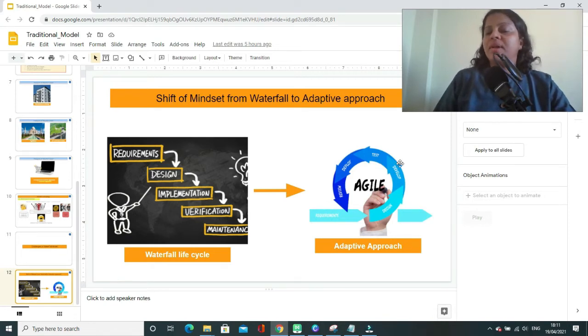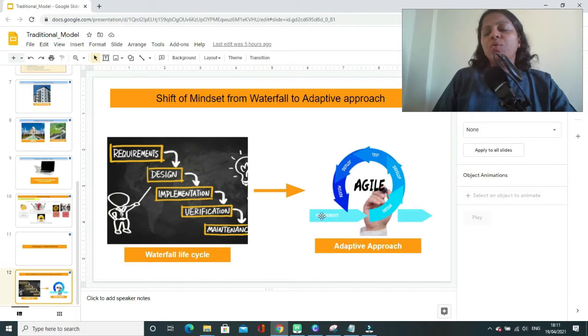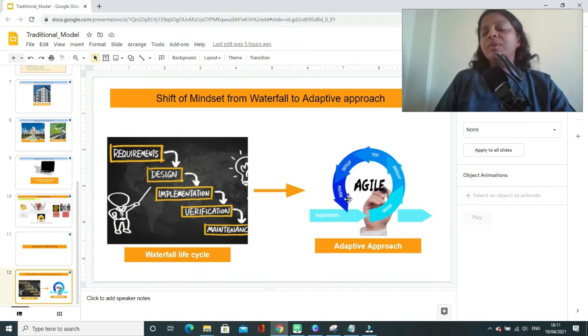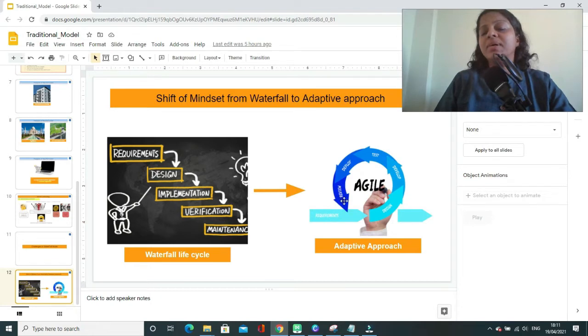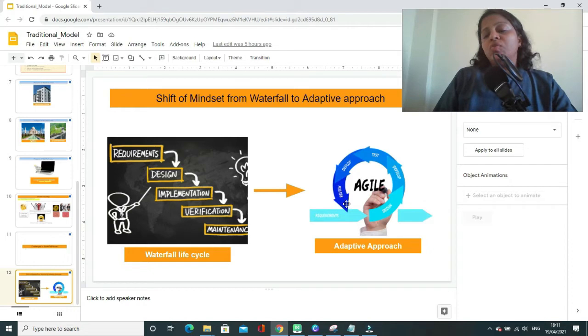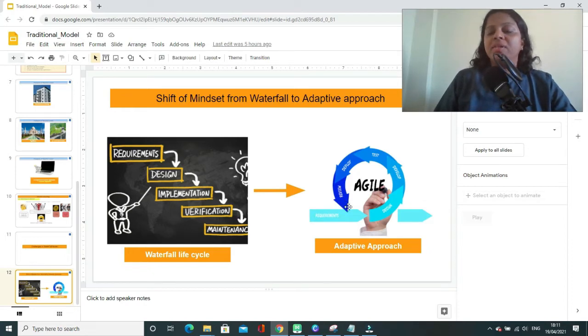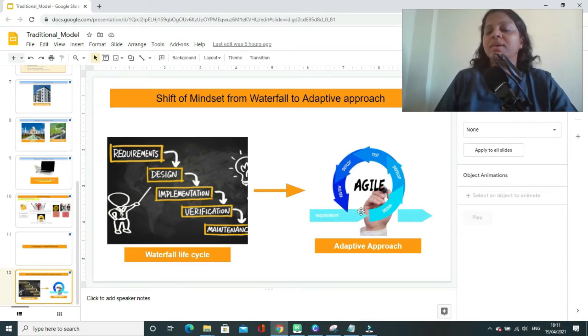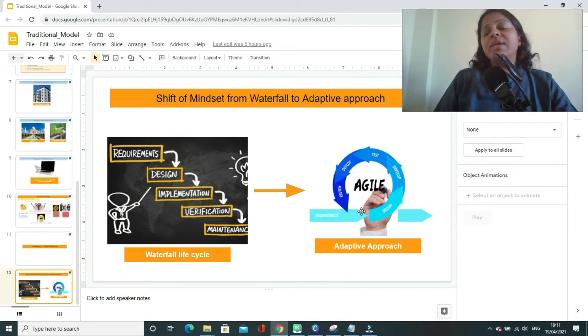In which you will be taking a small set of requirements and you will be constructing those requirements, reviewing, testing, and involving the customer to review that part of the product. That way you will be carrying out development in multiple iterations, and in each of the iteration you will be developing a small part of your product and you will be involving customer throughout your project life cycle.